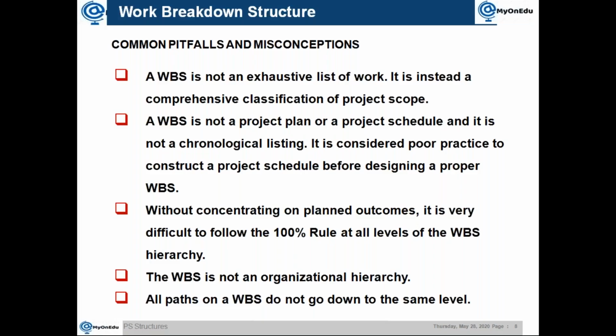Then, a WBS is not a project plan or a project schedule, and it is not a chronological listing. It is considered poor practice to construct a project schedule before designing a proper WBS. So the project plan or the task list schedule is something totally different. That is not a WBS at all.